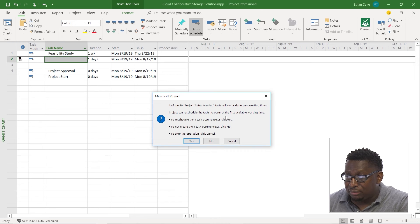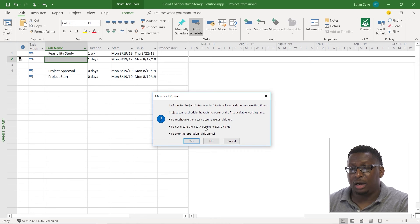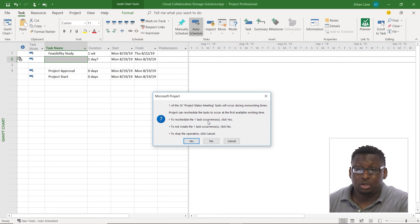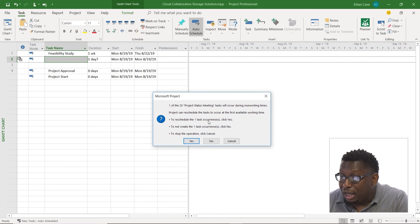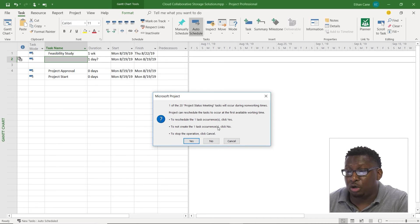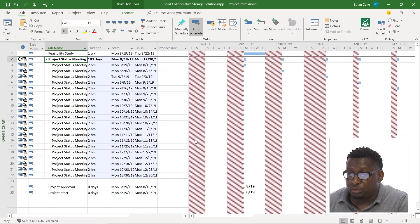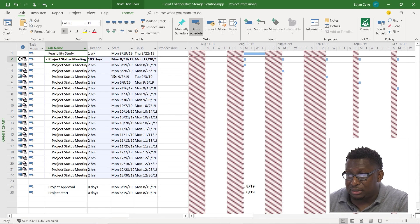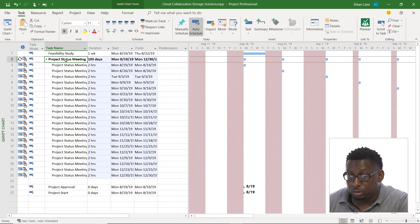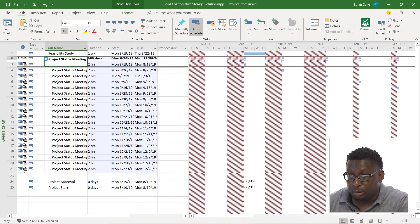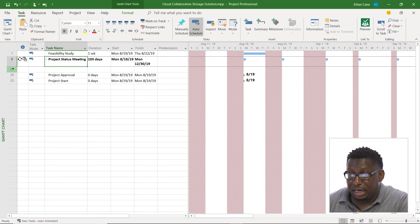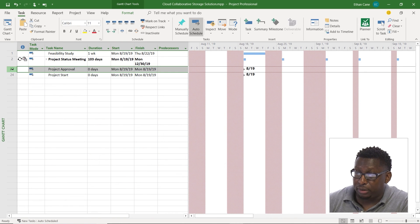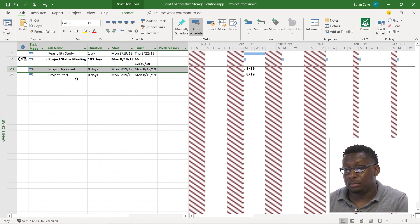Now anytime there's a task, and this is most likely our Labor Day, it's not going to let us do this on a Monday. I can choose to reschedule this or not create that one task, I'm going to say yes to reschedule it. And you can see yes, that Labor Day right there, it's moving that to the Tuesday. And there is my recurring task.